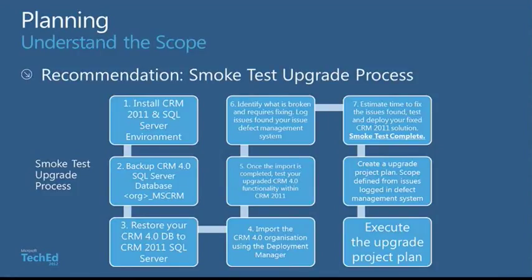You've done what you need to do, and from there you can hand it over to your project managers or people that would put together a statement of work or the plan to actually do the upgrade. From that list in the defect management system, you can now put estimates of how long each one of those would take to fix.